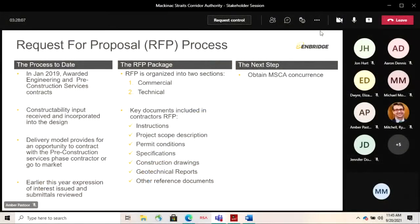So earlier this year, we also did issue out to the market expressions of interest, so we could vet and get a short list of contractors who in the future might be interested. Not only that they're interested though, but they meet a minimum criteria. We have an expectation of what the skill set is that the contractor will need to have to build this project. So we use that process as well to identify that short list. The RFP package itself